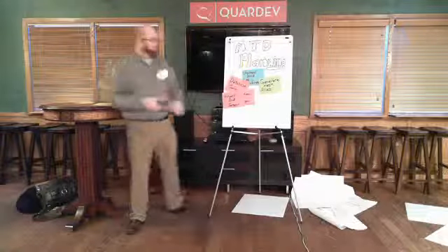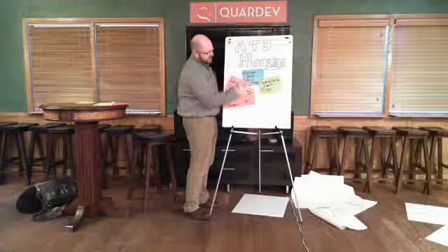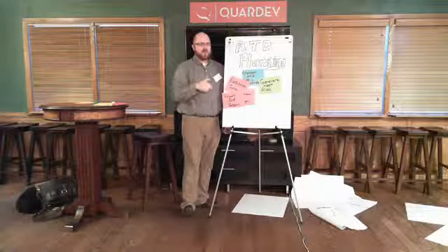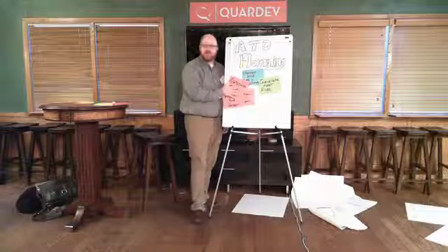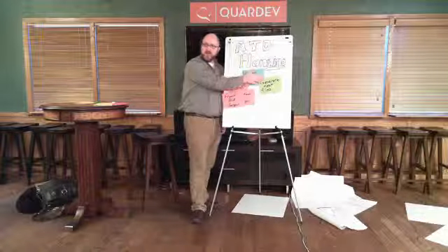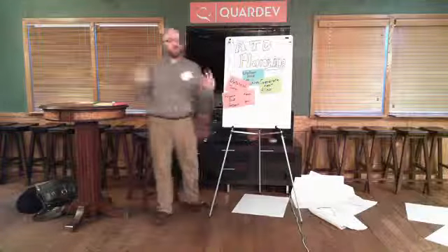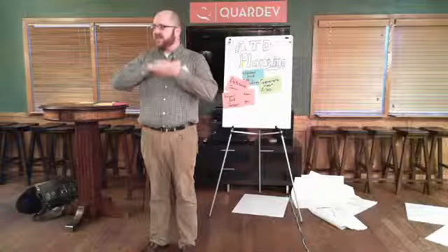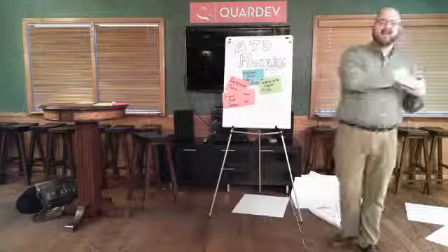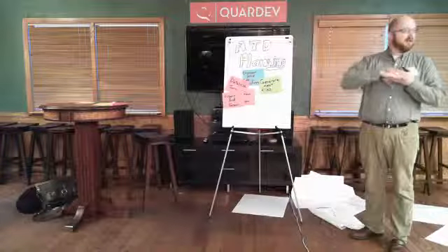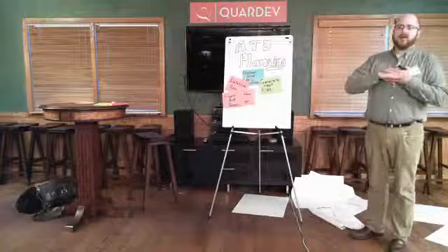What it helps you do is enable both sides to do prep. I mentioned in passing that the developers want to do an initial breakdown, and we'll do an initial test creation, and then we bring them together and change them, as long as you set expectations correctly that this is going to change, and in fact, the change is evidence of success. That's the way that I like to set that up, and it helps allay the concern of, oh, this is going to be a 4-hour meeting.